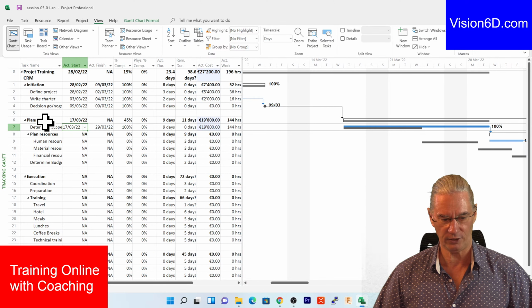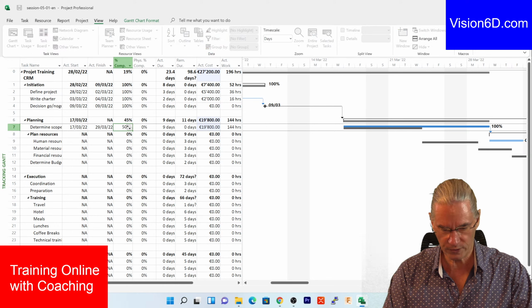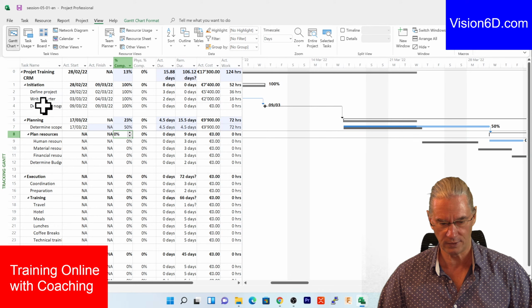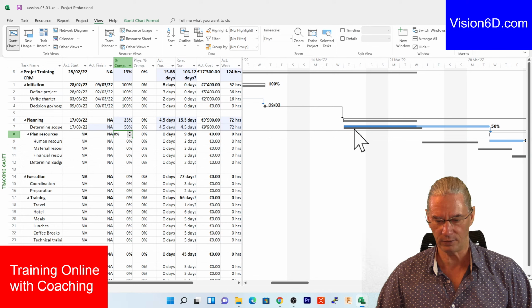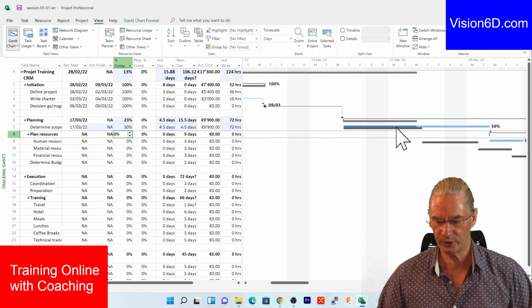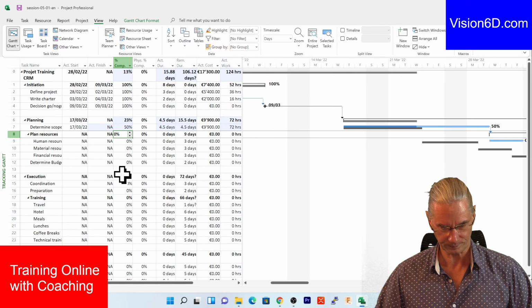I'm taking here the tracking table, and we had said here that this was accomplished at 100%. If we would say that this is accomplished at 50%, you see that once again we would have just one part of the blue bar in darker blue, and we would have the baseline where it still remains a bit of this.